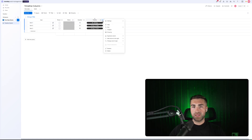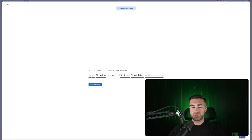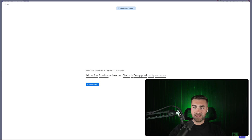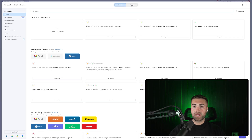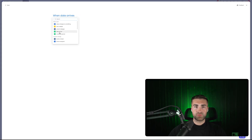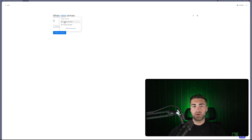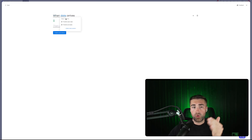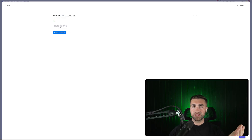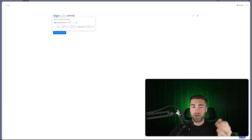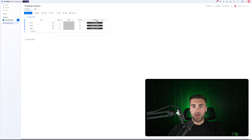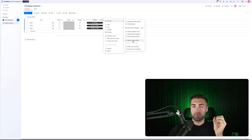Under Settings, you can also set due date reminders using automations. For example, when the timeline start date or end date arrives, you can trigger a notification or other actions. You can find this in the Automate section at the top right corner. The automation functionality with the timeline column has improved significantly recently and is now quite robust.